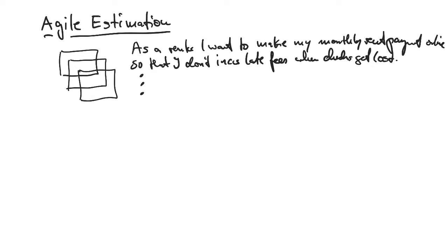generally you identify these stories at the beginning of a project during a requirements workshop. You identify additional ones as you go through each sprint. And you very likely identify many of them at the end of a sprint during the review of the product you've built in that sprint with your stakeholders. So you've got lots of these. But then the key thing is, every time you identify a new story, or if you don't want to do it every time as soon as you find a story, maybe periodically once a week, every couple of days, at the end of each sprint before the new sprint starts, you score the stories.